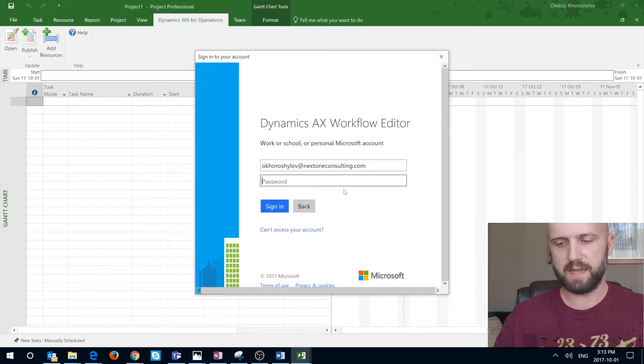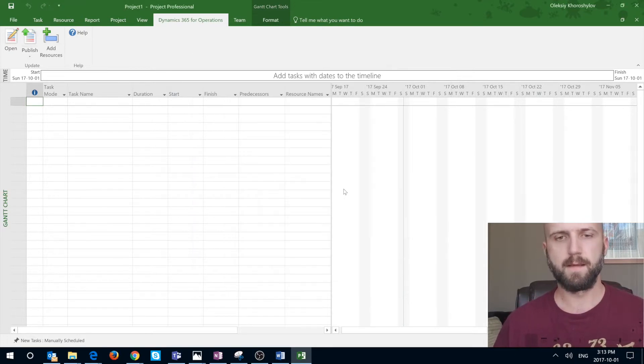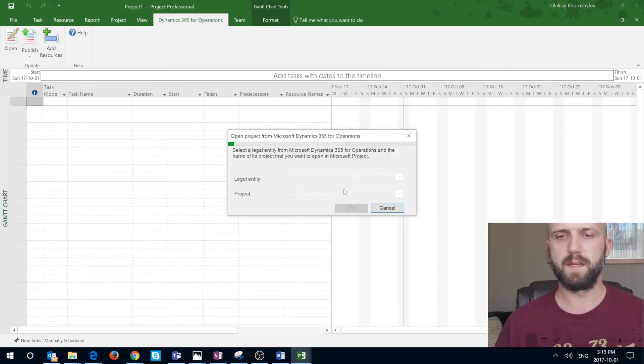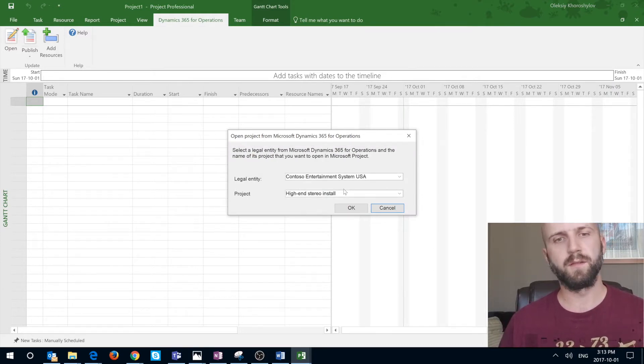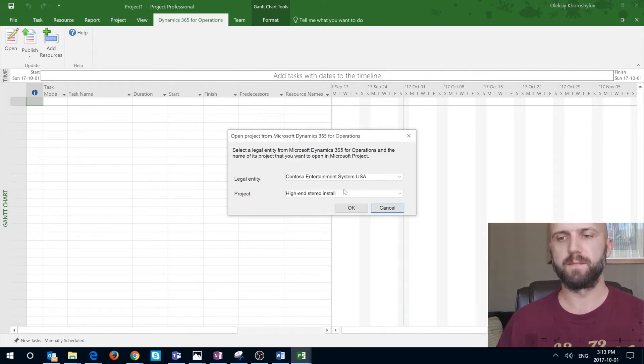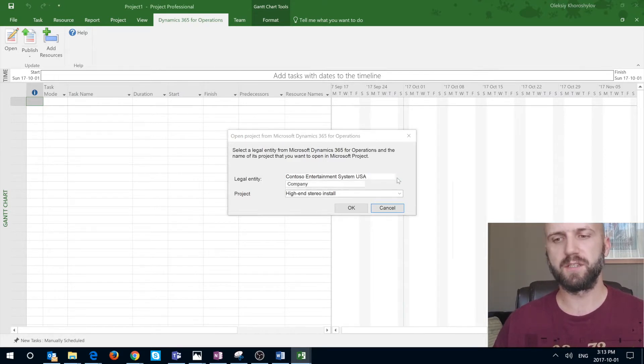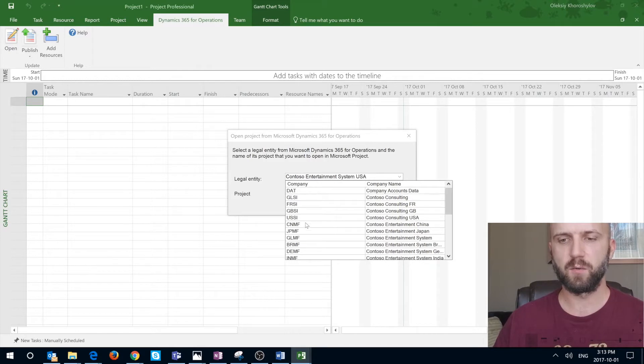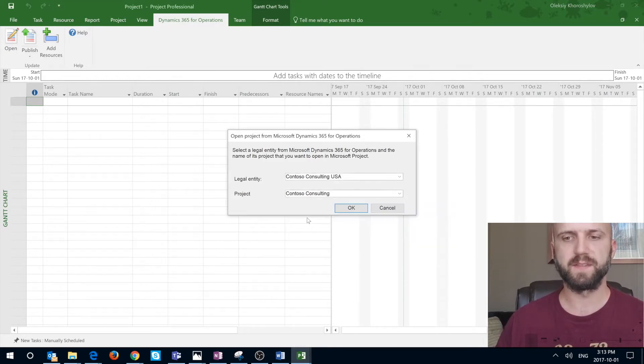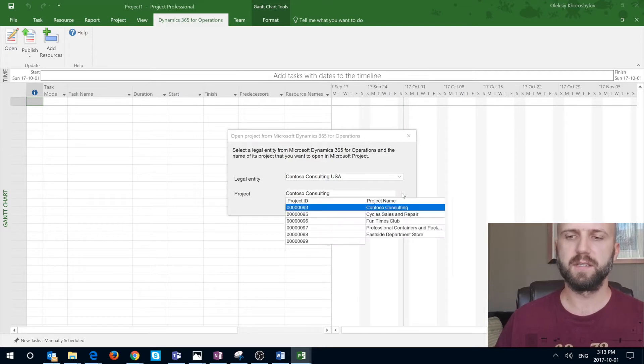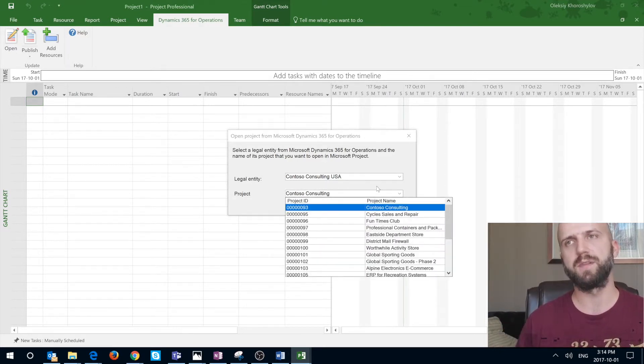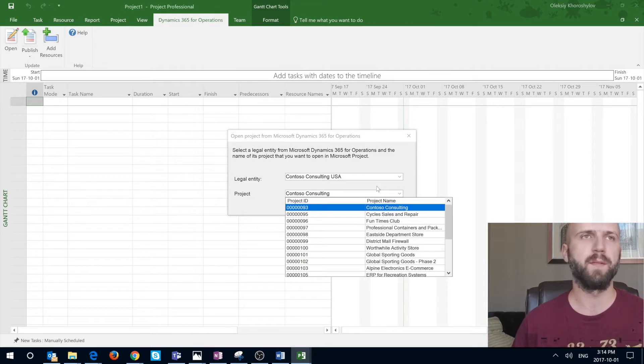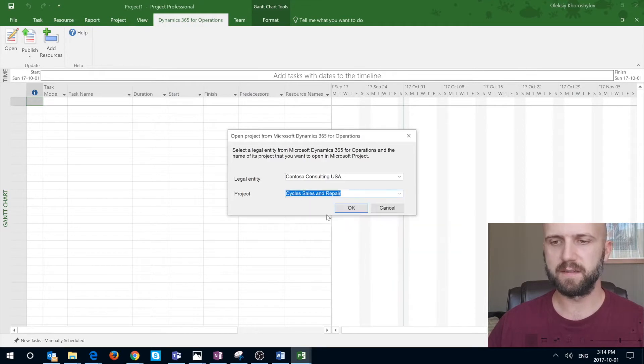Once I enter my email address I have to enter my password and once you log in the system is prompting you which project would you like to open. First of all this selection is for the legal entities here so I can select multiple legal entities. For example I'm going to select U.S. Consultant. Only the projects that have calendar attached to them will show up in that list. I'm going to select this cycles and repairs for example.